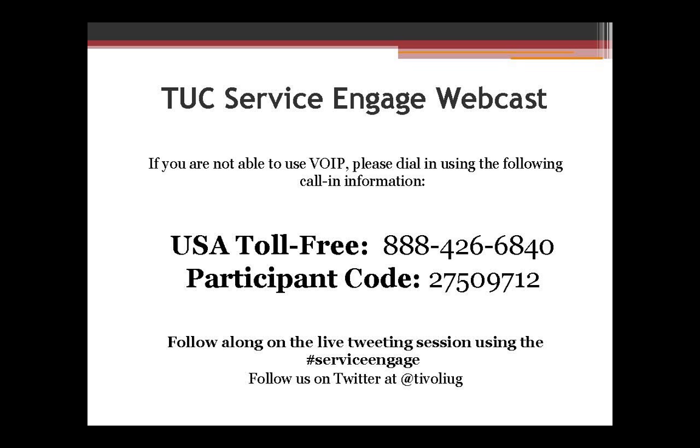For example, one section of the board has a bunch of unstarted tasks, and at the other side of the board, there's a bunch of tasks that are completed. To get from one side to another, you have to start working on the task. That's the first phase. Each developer can only have one task in that state.